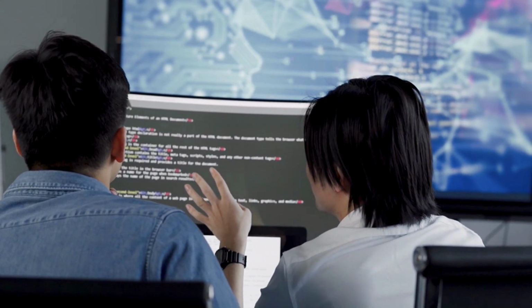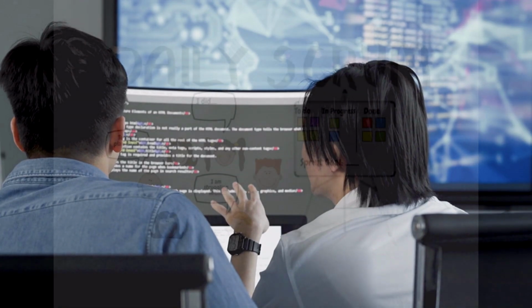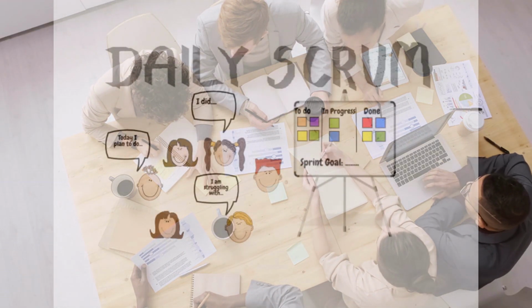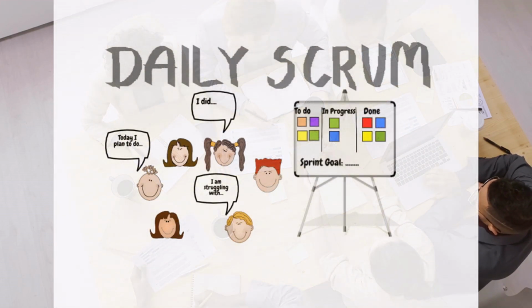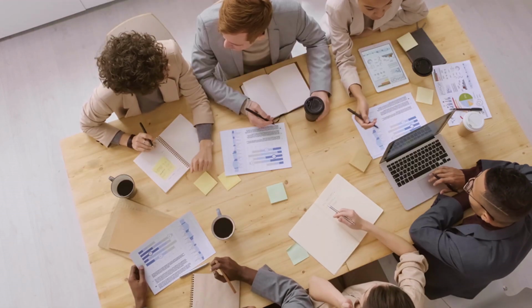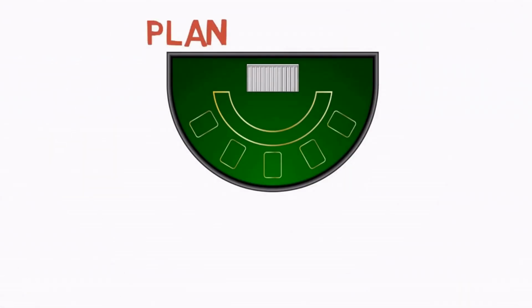There are many different meetings in Scrum. These meetings are called by different names. There are a huge bunch of them, at the beginning of sprints, at the end of a sprint. Moreover, every day there are 15 to 30-minute meetings, called daily, at which each team member talks about his current tasks, talks about what he did yesterday, talks about what he will do today so that the whole team is in sync. One of the main meetings is planning poker.